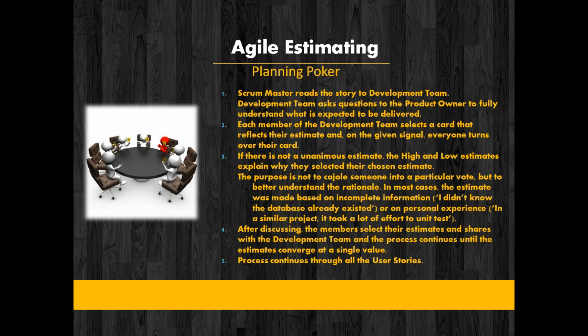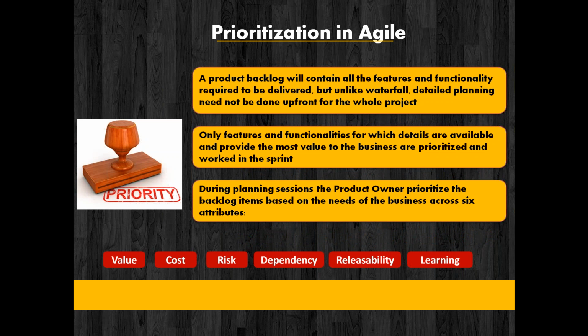So that was the agile estimation and the various techniques of applying the agile estimation. So just to conclude on agile estimation, we first do the relative estimation, that is on t-shirt sizing, and then come out to the story points level. In the story points, you do it by using different games like planning poker. And then later, the team member who is going to pick up that requirement picks it up and does the absolute estimation that is based on hours.